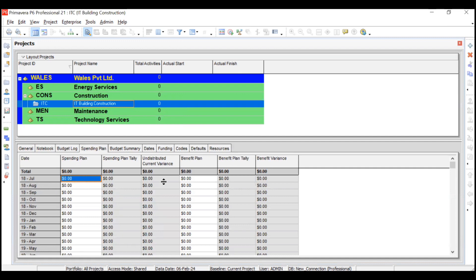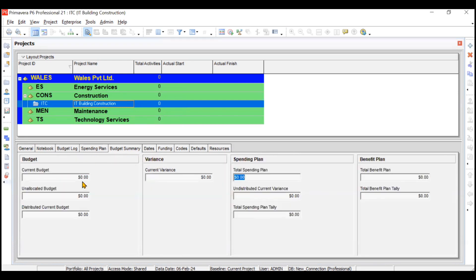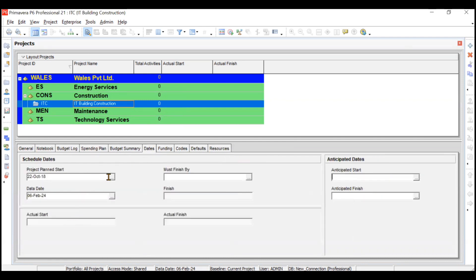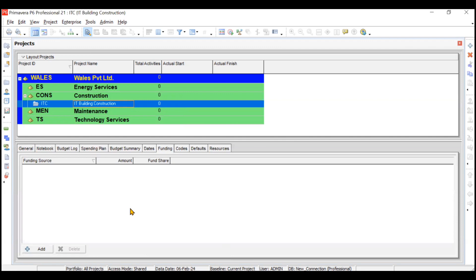The Spending Plan lets you identify how much will be spent in each month or period. Budget Summary shows the total budget, unallocated budget, spending plan, benefit plan, and variances. Under Dates you can mention project start, plan start, must finish by constraint, data date, anticipated start and finish dates, actual start, and actual finish. Under Funding, if you have funding sources such as government agencies or CSR contributions, you can add those funding sources here.